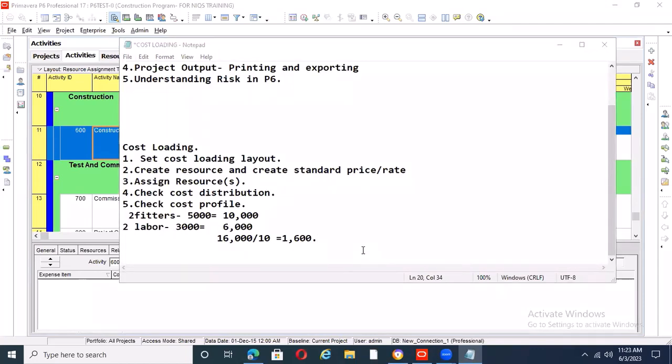Please, what happens if the total budgeted cost is more than the BOQ provision? You go and start looking for where you made the mistake, because you can't give what you don't have. Your BOQ provision must be the limit.